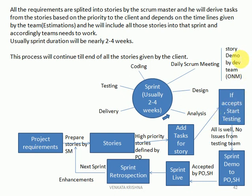Once we accept the story based on the story demo, we start actual testing. We will identify bugs and send them back to the development team; they fix them and send it back to testing. This process continues until all bugs are closed. When everything is working fine, we give the sprint demo to the product owner and stakeholders. Once they accept it, the code goes live — to production. One release may have multiple sprints; for example, one release with three sprints must complete sprint one, two, and three before everything is combined and pushed to the live environment.